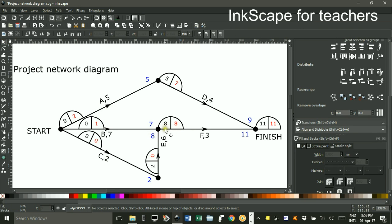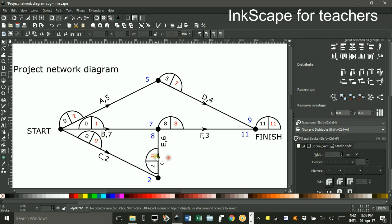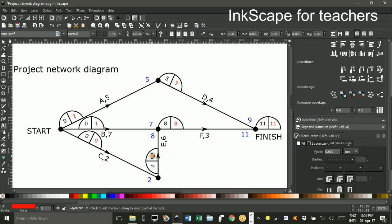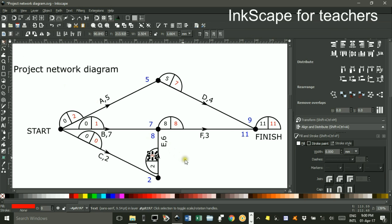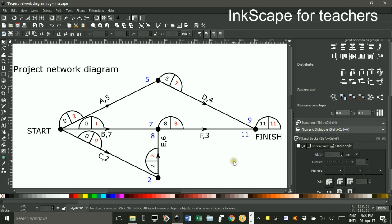Coming back this way, 8 take 6 is 2. Make that 2. The red number again, 2 take the duration, 2 take 2 is 0, which is what I've got there. So I've completed all these boxes.